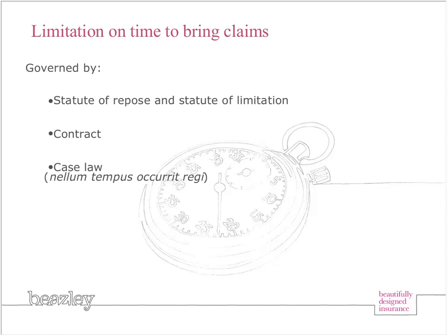So those of you who practice in Connecticut, you probably know about the case where the Supreme Court allowed the state of Connecticut to sue the professionals long after the statutes of repose and limitation had expired. And the court essentially said, hey, this "no time runs against the king" concept has been on the books for ages and ages. We haven't changed it, and it's still in effect. So you want to have some knowledge about the jurisdiction in which you're practicing.